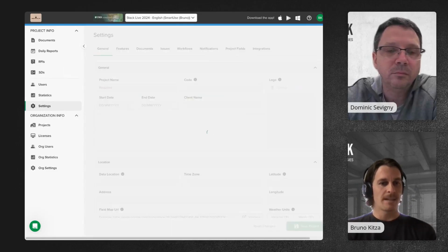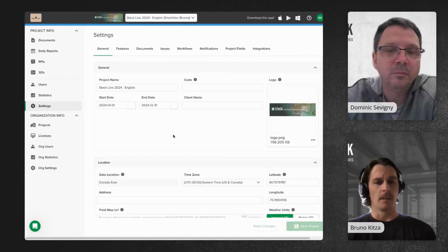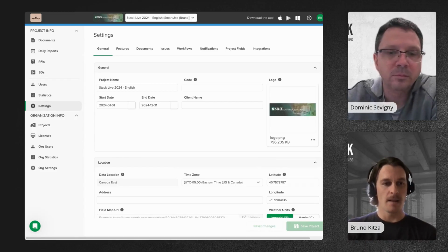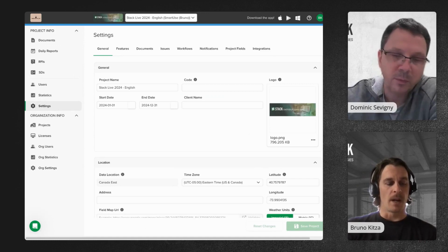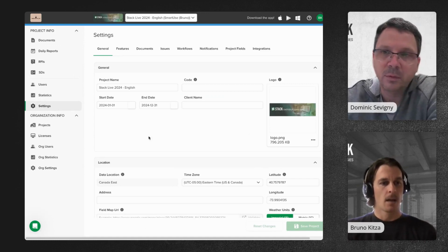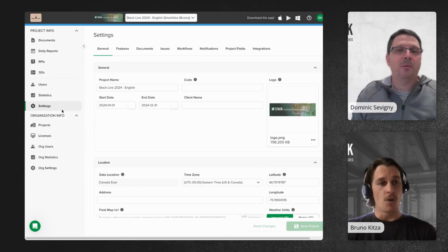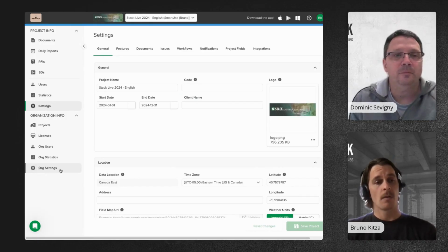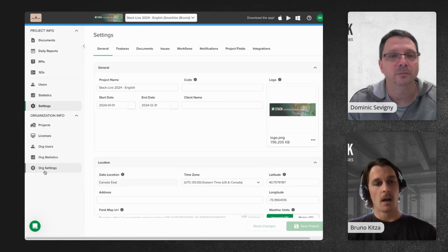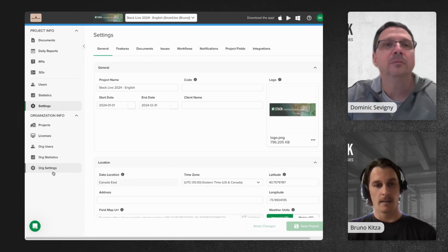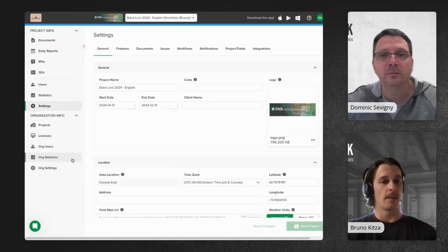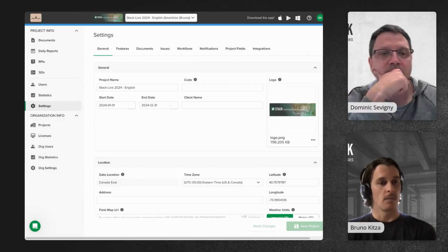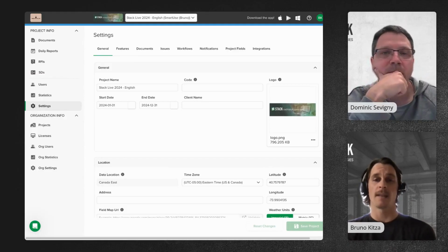So back to the settings, there's a little detail that will all make sense, all tie up together quite nicely. We've changed, a few weeks back, how a new project is created. We used to base the new project on the organization settings. We've steered away from that and will now be using only an existing project, so that we have a template that we're going to reproduce the settings from.